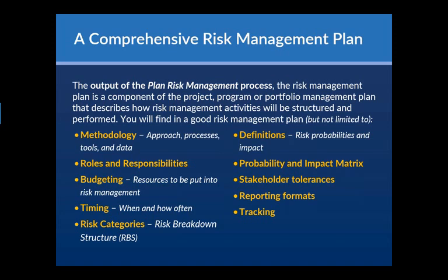Do you have an understanding of your stakeholder tolerances? We're going to talk a little bit about that in a second, but kind of documenting, is this perceived to be a high level risk project, and is it because we've never done it before? So that kind of information. And the last two, how are we going to report and how are we tracking our information? So important document, and again, tailored to your specific project. Most organizations will have a template, and then they'll just tailor it when a new project comes along.